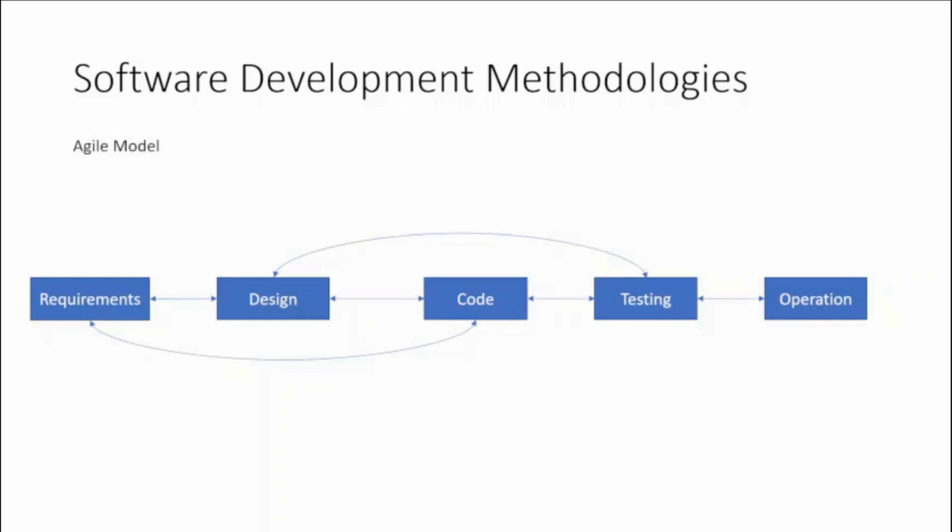It focuses on flexibility, continuous improvement, and speed. The agile methodology follows an incremental approach. Developers start with simplistic project designs and then begin to work on small modules. The work on these modules is carried out in weekly or monthly sprints, and at the end of each sprint, project priorities are evaluated and tests are executed. Thus, the equivalent stages of the waterfall model are completed at every single sprint.